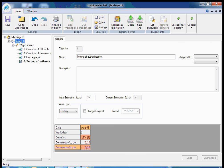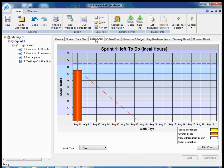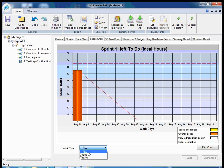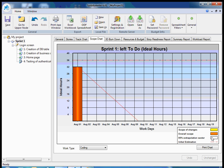Now I can look at the burndown chart. So this is for coding. It shows the original estimation of sprint scope. And because I know the exact length of the sprint, I know how many ideal hours the team was making each day on average. So I can always predict when scope will be done. And this is the prediction for coding.